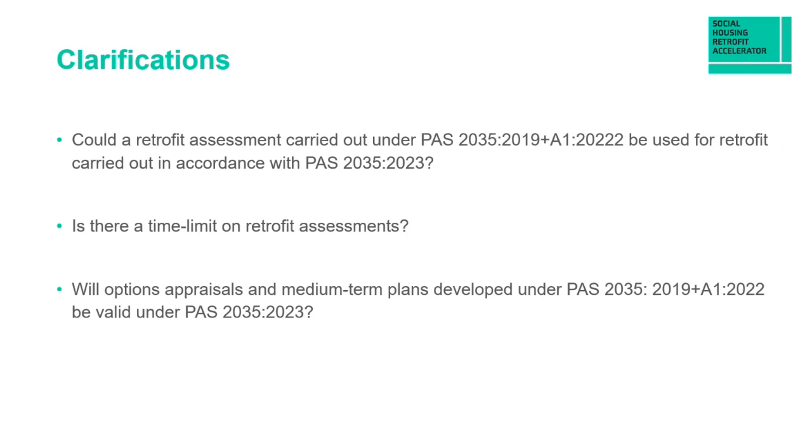One of the questions that's being asked is, could a retrofit assessment carried out under PAS 2035-2019 version be used for retrofit carried out in accordance with PAS 2035-2023 version? And the answer to that is no. Requirements for retrofit assessments differ between the two PAS standards, and therefore retrofit assessments done to the 2019 version can only be used for 2019 version projects.